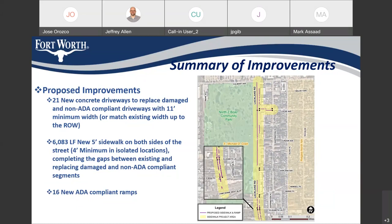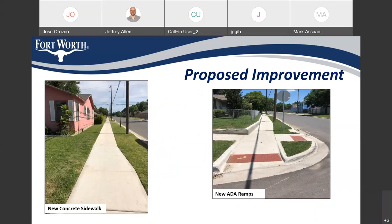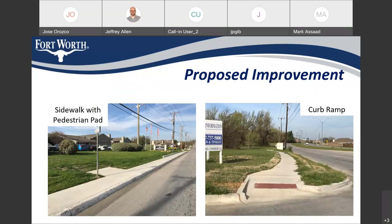We'll be filling in all these gaps — just over 6,000 linear feet of 5-foot sidewalk. In some areas where space may be a little tight and isolated, the minimum you will receive is a 4-foot width of sidewalk. Also with these improvements, we will be including 16 new ADA-compliant ramps. When construction is complete, you can expect a new concrete sidewalk with new ADA ramps, as shown in the pictures.